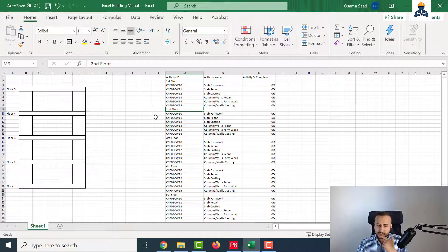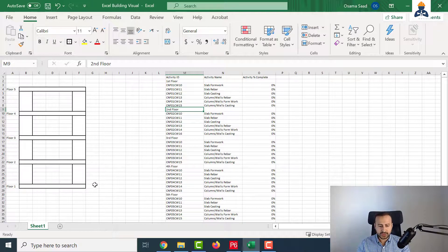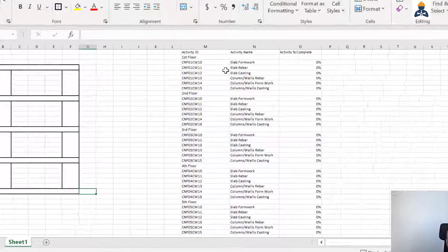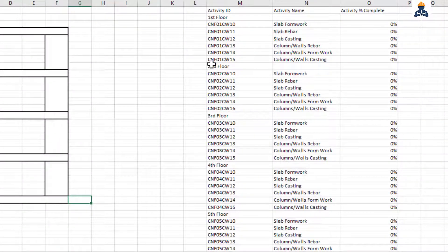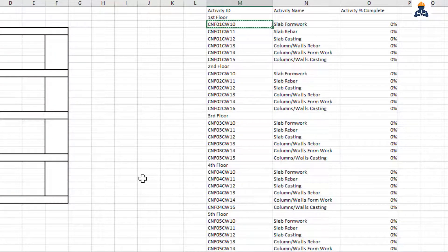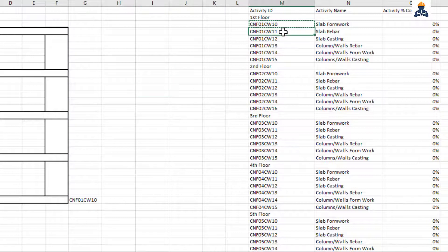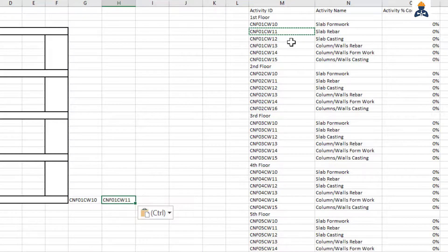The second step is we want to show the progress or the colors based on the progress of formwork, rebar, and casting. So there are three parameters in each floor. I will do the coding process right now. So this is floor one. I have the slab, and I have three possible values for the slab: formwork, rebar, and casting. I will take the activity ID here, just paste it, and for the rebar as well, and for casting.